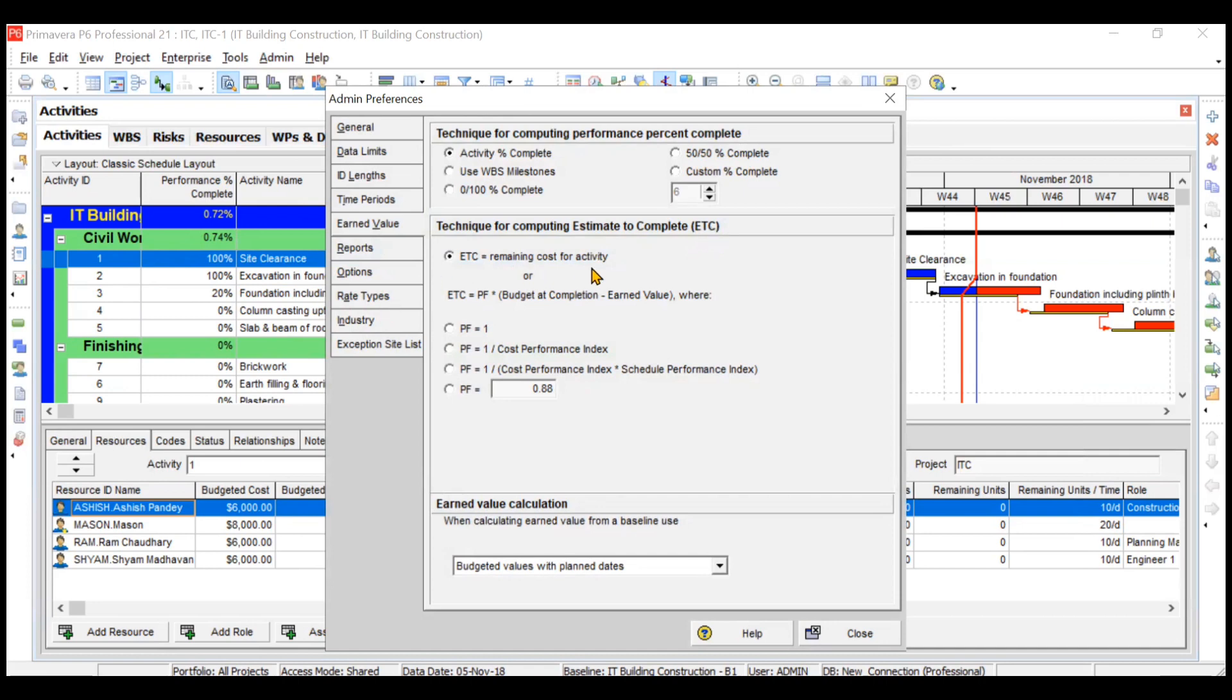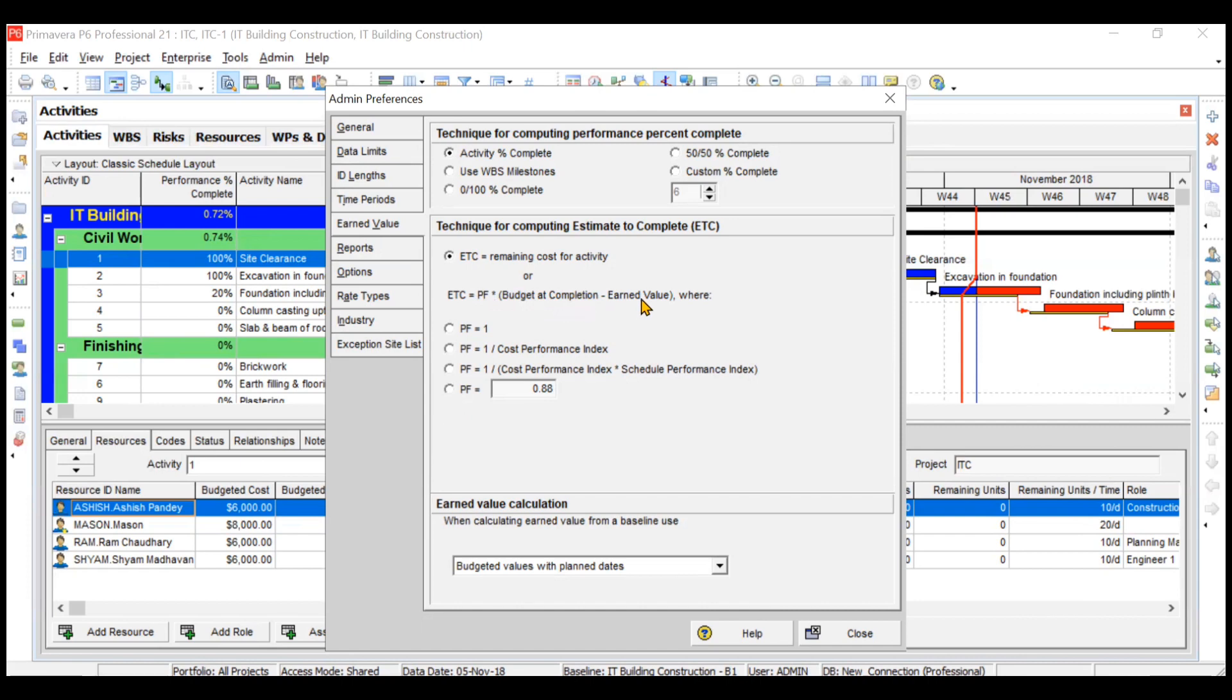You can define your PF also here. PF is nothing but some particular performance factor which is multiplying by the budget at completion minus earned value, so you can change the value of this PF also. Similarly, when calculating earned value from a baseline, we are using budgeted values with planned dates. If you want to change the setting, you can change the setting also.